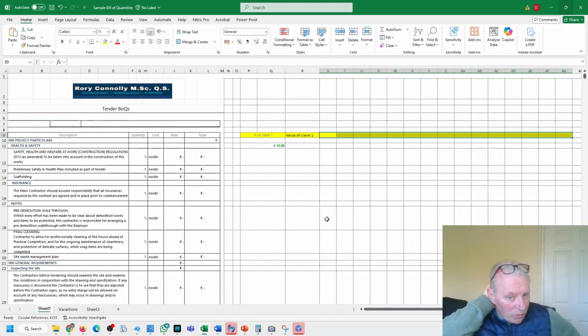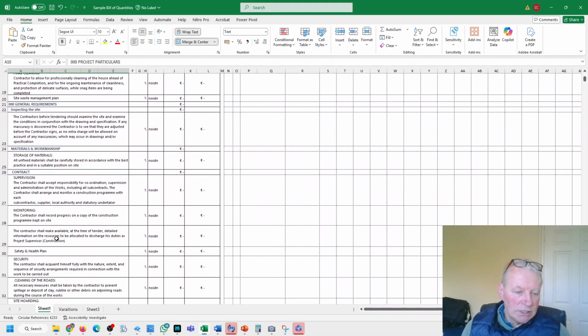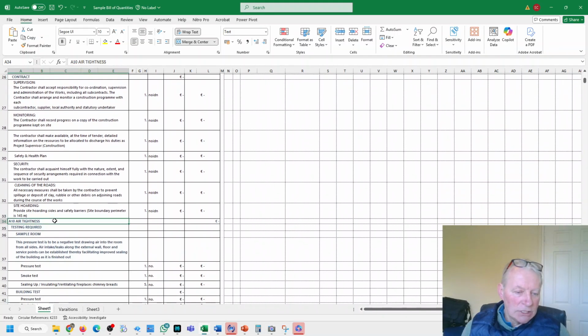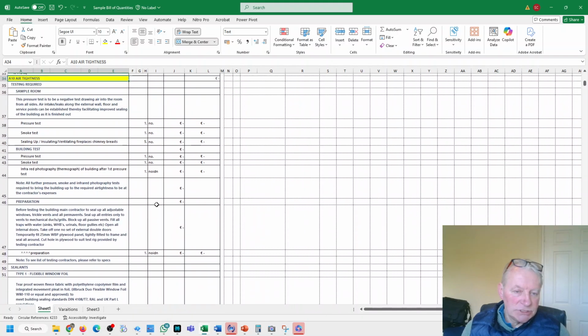So quantity surveyors push for it, one because it's an income stream, but two, it's traceability, it's dependability, it's a system of controllability. What it actually is, is a breakdown of project preliminaries and then a breakdown of the actual construction elements, and then you can see demolitions there.